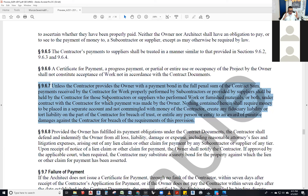Generally, money paid to the contractor to pay his subs goes into an account and is supposed to pay that subcontractor — it's not for him to put somewhere else. People use the phrase 'steal from Peter to pay Paul.' This really protects the owner so that a subcontractor doesn't go after the owner saying 'you haven't paid me' when the owner already paid the contractor to pay them. The subs don't have any claim against the owner — they have to go after the contractor for payment.